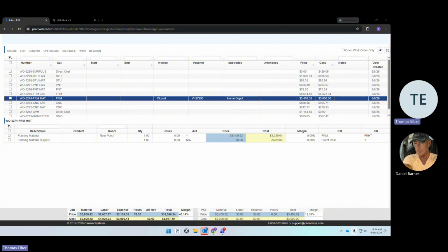That SCA you're creating as a PM to send to your subcontractors so they understand what they're doing and how much they're getting paid. In order for you to really understand how much you can pay a sub, you have to understand these work orders. If they're going to be supplying material and the labor and everything required to accomplish all the framing on this job, you should be able to come into here and quickly determine that between the framing material and labor, you can spend exactly $7,522.64.